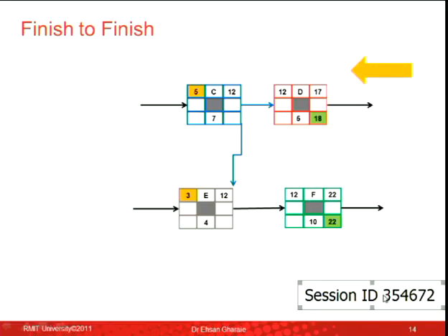So those 18 and 22 are just my assumptions. Activity F, 22 minus 10, 12. Activity E, there is only one arrow going backward from F to E, so I can take 12 and put it there. 12 goes there, 12 minus 4, 8.